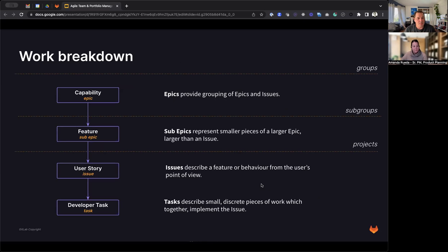With its comprehensive data model, GitLab enables team planning and portfolio management within a single tool. Use epics, which nest up to 7 levels, to represent higher level planning objects. Issues and tasks allow you to decompose work for your DevSecOps teams. This structure allows you to decompose complex and long-running initiatives into incremental and iterative units of business value.